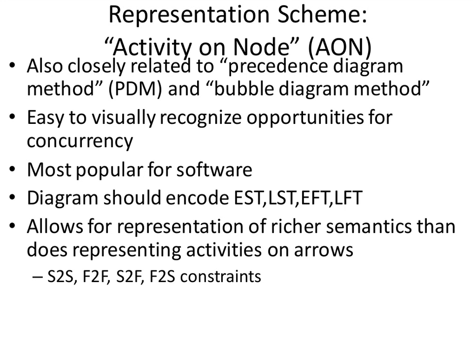There can be finish-to-finish ones. This one can't finish until this other one finishes up. And so, for example, debugging may not be able to finish until the testing is complete, etc. So you should be aware that we're presenting an extremely simplified version of these sort of activities.